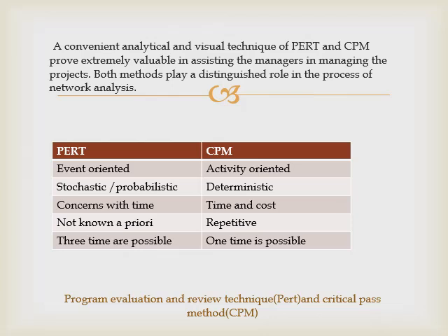In PERT, the total project is regarded as a random variable, and therefore associated probabilities are calculated so as to characterize it.